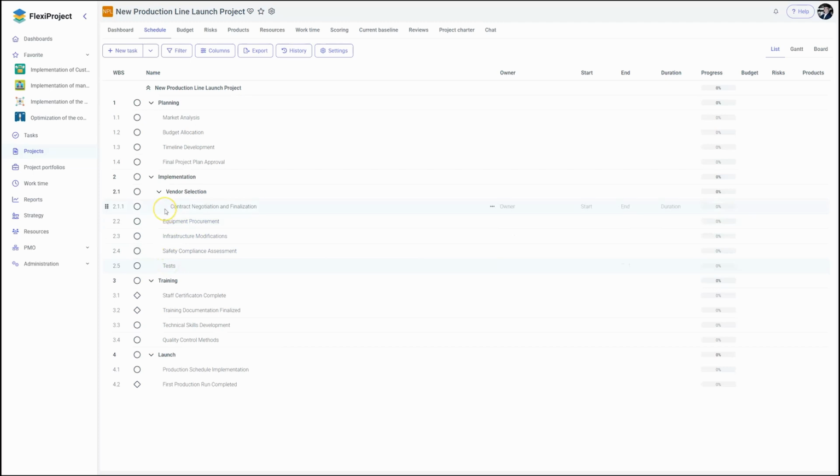One last feature that is especially handy when creating a timetable is the option to duplicate a task. For instance, we have a task named training that we want to copy. This is helpful when we require 2 distinct stages to train different departments. To create the 2 distinct training phases, we right-click the original task and choose Clone Task. We have the option to duplicate either only the individual task or the task together with all its associated subtasks. I will choose to duplicate the whole task with its subtasks. A copy of the task is created easily and placed right below the original.